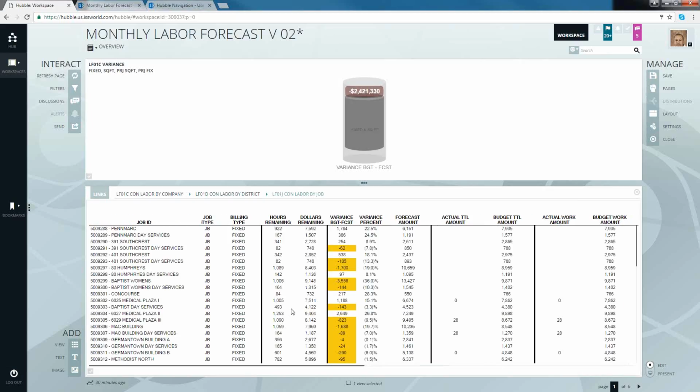So now you have the breakdown here, and you can see which are the ones that are coming in a little shy. Now, for these that are like 4 hours, showing a variance of 4 hours or even 24 hours, you have a whole month to shave an hour here, shave an hour there off of an employee. So those aren't as critical as these big ones that are close to 1,700 hours shy. So you can go through and figure out how you're going to address those. More times than not, those are the ones we need to look at, those labor budgets, because those are the ones that have major issues.